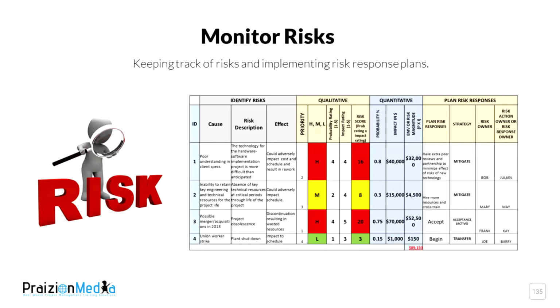And then you also want to identify any new risks that you haven't identified previously. So this process, monitor risks, is a loaded one. A lot of stuff happens here. Was my response good? Are there any new risks? Are the old risks where we left them? What can we do to better improve our risk approach? All that stuff happens in monitor risks.